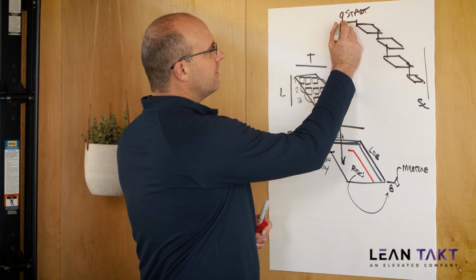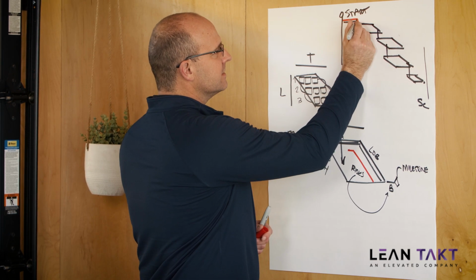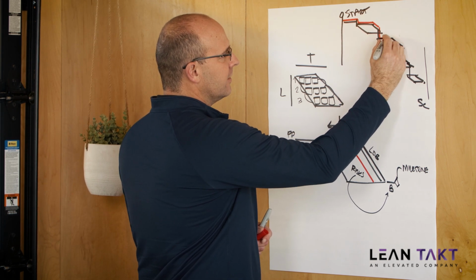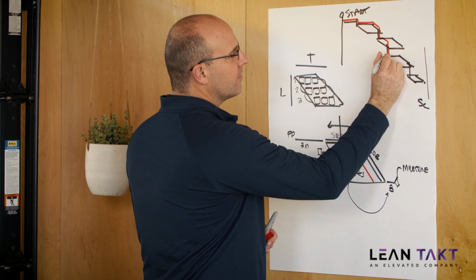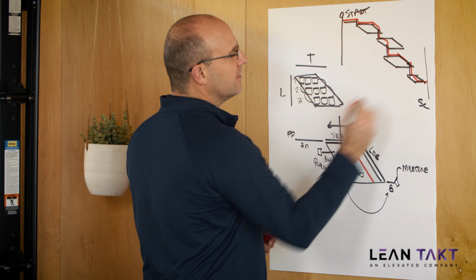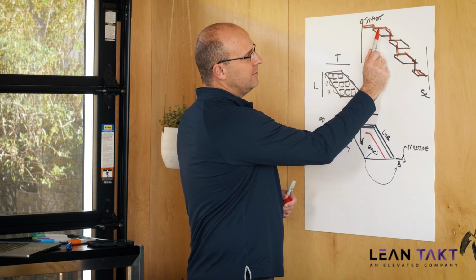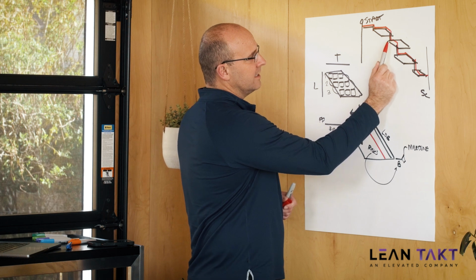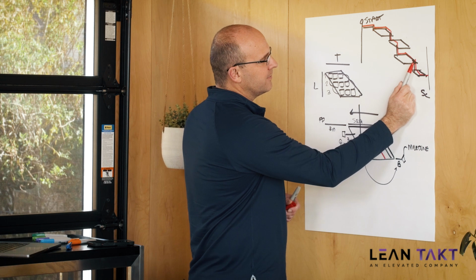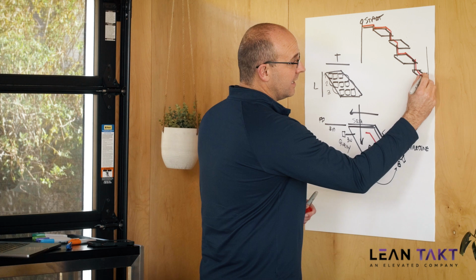So your path of critical flow, or your critical flow path, runs through these sequences, and it runs through your overall plan to where you can identify your correct longest path all the way to the end of your schedule. Okay? So sequence, interdependence tie. Sequence, line of balance, buffer, interdependence tie. Sequence, line of balance, interdependence tie. Sequence, line of balance, buffer, interdependence tie. Sequence, line of balance, buffer, and then the tie to the end date.